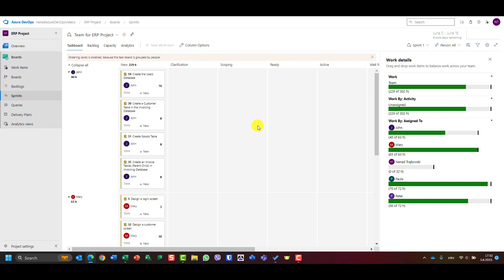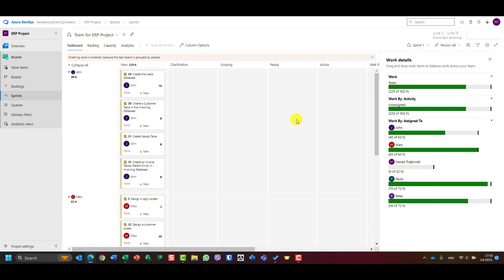Last but not least, don't forget: when you are in sprint planning on day one — June 5th is the day when the sprint begins, and today is June 5th when I'm recording this video — it should be all green. And you know what, Mary is on risk, because if Mary needs more hours than estimated, she will not be able to complete all the tasks.